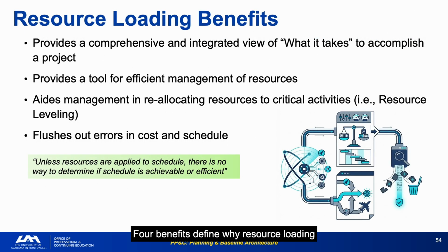4 benefits define why resource loading is worth the effort. It validates that the schedule is achievable with available resources, supports management decision-making, enables resource reallocation, and flushes out cost-schedule integration errors. Unless resources are applied to the schedule, there is no way to determine if the schedule is achievable or efficient. This is why programs that skip resource loading end up with schedules that look executable on paper, but